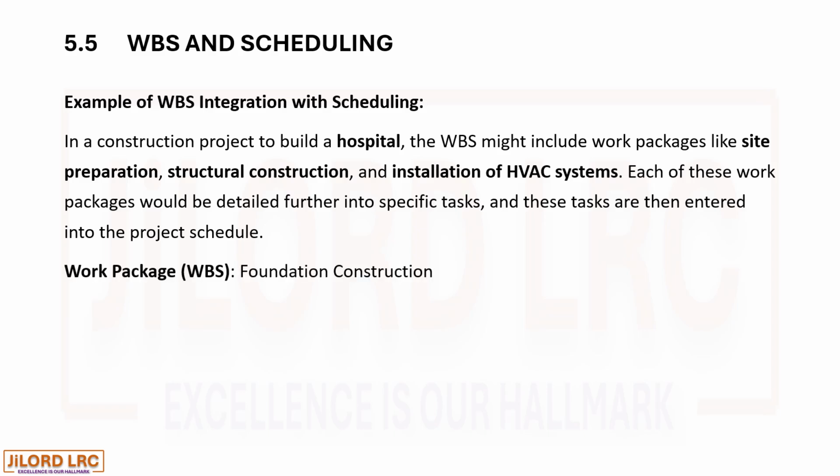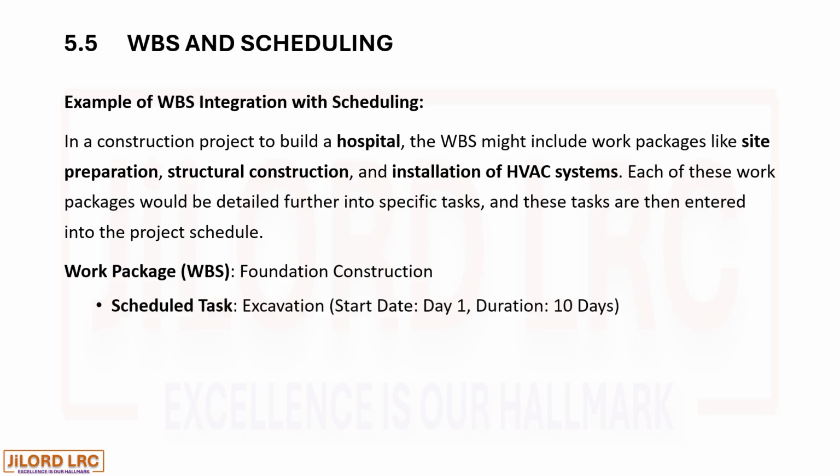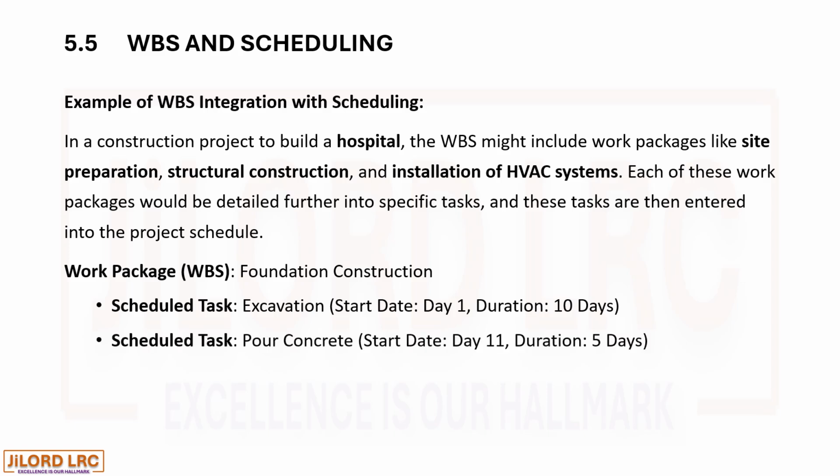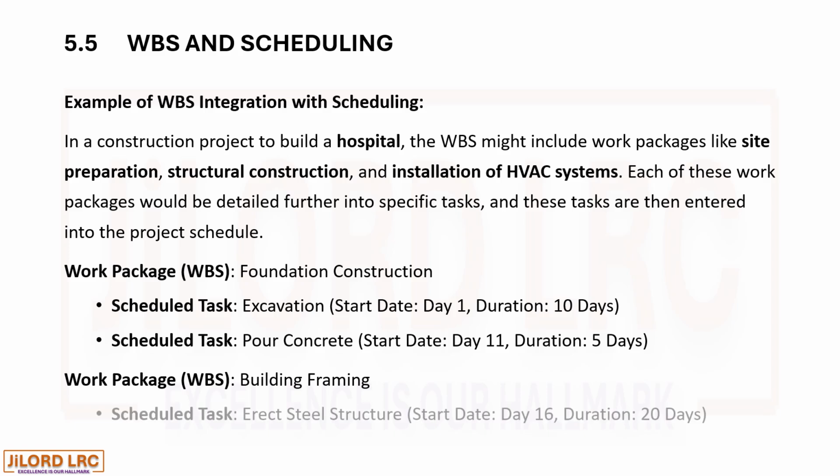Work package WBS: Foundation construction. Schedule tasks: Excavation, start date day 1, duration 10 days. Schedule tasks: Pour concrete, start date day 11, duration 5 days. Work package WBS: Building framing. Schedule tasks: Erect steel structure, start date day 16, duration 20 days.